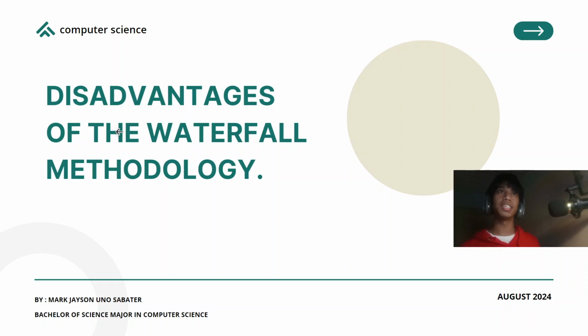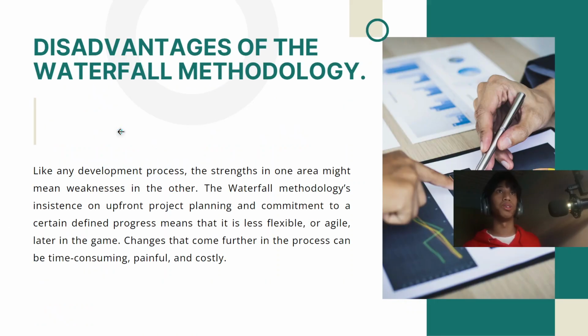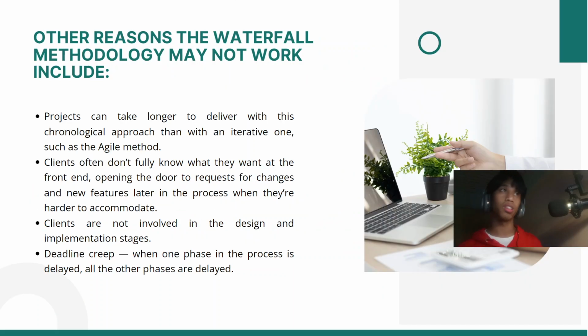So what is the disadvantage of the waterfall methodology? It says any development process's strengths in one area might mean weaknesses in another. The waterfall methodology's insistence upon upfront project planning and commitment to a certain defined progress means it is less flexible or agile later in the game. Changes that come further in the progress can be time-consuming, painful, and costly.